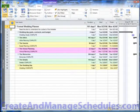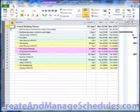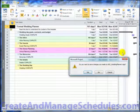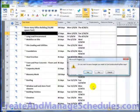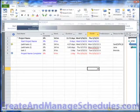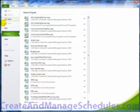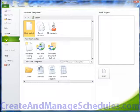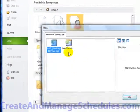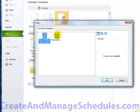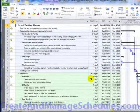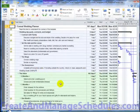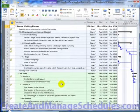Now in the future when you want to use that template, let me close this plan and I'll close this one and clear this one as well. So let's say you're coming in to create a new project file and if you come in to New and go to My Templates, you'll see whatever template you've saved. We've created a construction one and a wedding planning one. Just select the one you want and click on OK. And as you can see, Project opens up that template.